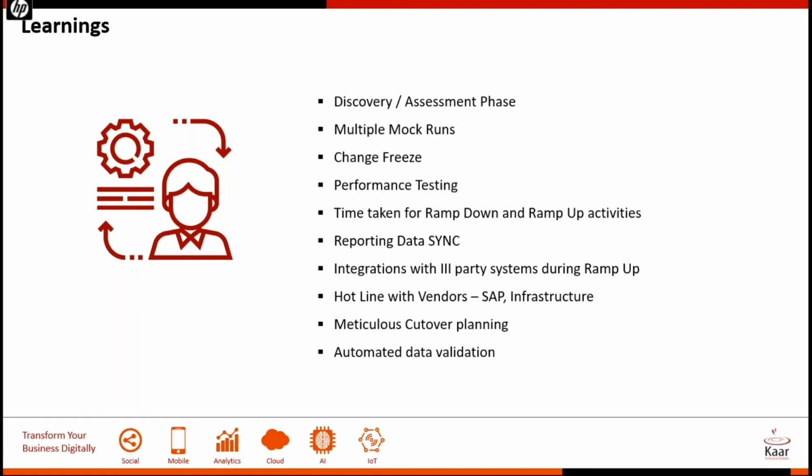The fourth one is performance testing. Why is performance testing important? Because once you go live, you're on new hardware, a new database, and a new application. Users are finding new screens, and they're trying to figure out how to run this. So there are so many changes. If you have not tested your performance end to end, you could potentially have problems and bottlenecks. So when you run your performance test, keep it as real, as close to the production scenario as possible.